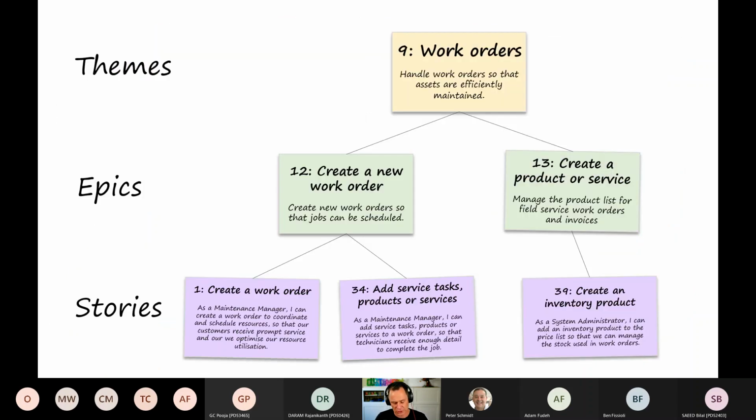And if we think about the structure of the requirements, we've got some themes that we're going to be working on. Those themes can be broken down into epic user stories, and then the epic user stories get broken down into smaller, much more implementable sized user stories. So I like working at the epic level when I'm doing user story mapping. We could have 10 epics. I've worked on initial product backlogs where there's 100 epics. That was a big multi-year program, but it's in that kind of range. 10, 20, maybe 50 epics is pretty common. We don't want to work with hundreds or even thousands of user stories. So we want to stay at that epic level.